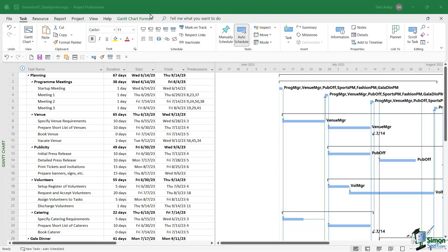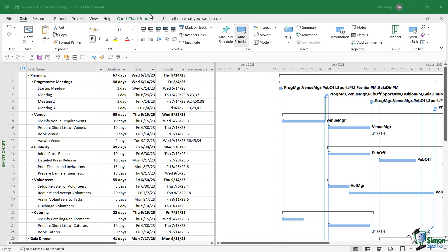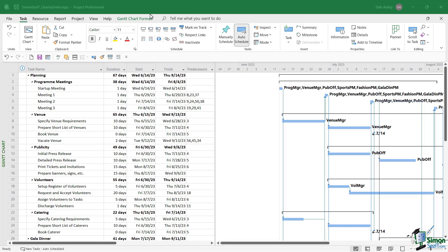We recognize that it's important to deal with resources. The key issue here is that when we split a project, we need to make sure those projects are using the same resources. The way that we do that is to set up what we call a resource pool. Once we've set up a resource pool, we can then share that resource pool amongst several projects.